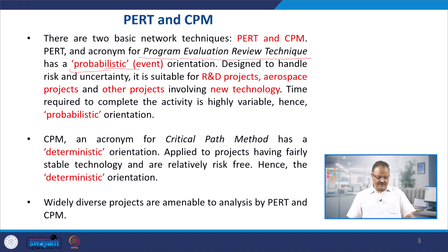So for developing the networks in such kinds of projects, we take the help of PERT, Program Evaluation and Review Technique. This technique is designed to handle risk and uncertainty, and it is suitable for projects like R&D projects, right? In R&D projects, you're not sure that if we are trying to find something, we will be able to get certainly, at the end of the day, the desired output. We are not going to be sure in the beginning, so there we have to take the help of PERT.